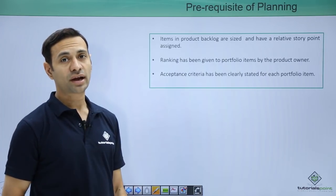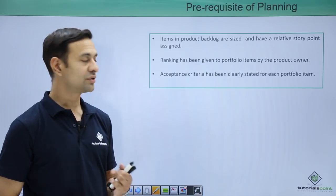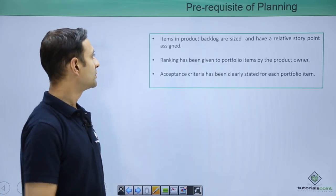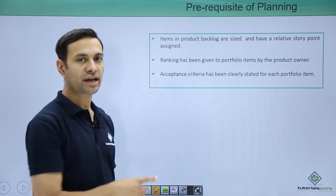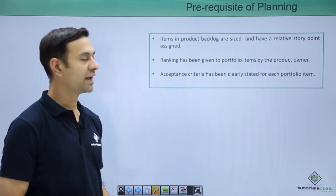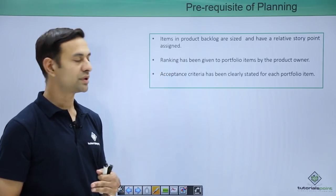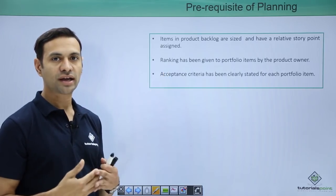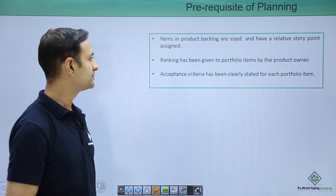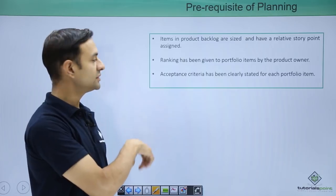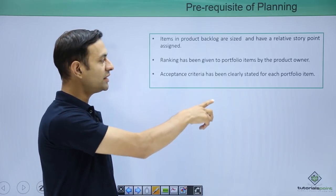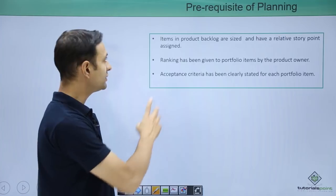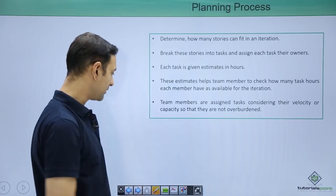Pre-requisites of planning: what should be done before planning. Items in the product backlog should be sized properly and have proper story points assigned to them. Ranking should be given to portfolio items from higher to lower, which should be done by the product owner. Acceptance criteria should be clearly stated for each portfolio item. These were the prerequisites of planning.